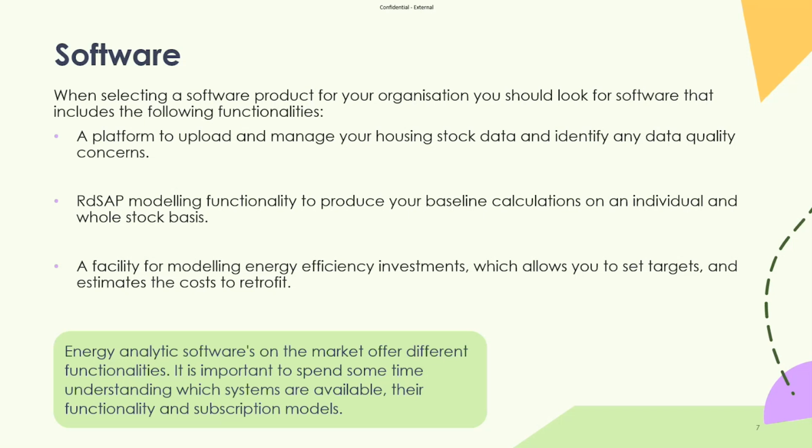The other thing with the costing as well, when it comes to costing those retrofits, is how flexible are those costs and where have those costs come from? So some software providers update their costs based on contractors that they've had experience working with. It could be from kind of market data. So it's good to understand where their costs have come from, but also, is there a way to plug in your costs into it if it needs changing? So for example, actually you know how much EWI is costing you per square meter. Is there a way to plug that figure into the model to update it based on costs that you're experiencing?